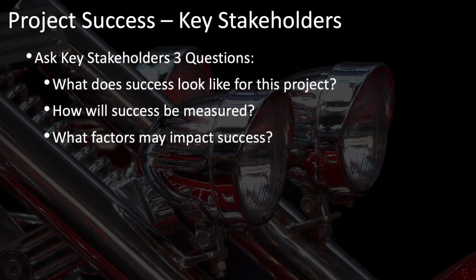Whether the project manager was involved in the project benefits management plan or not, the project manager should still ask the key stakeholders these three key questions surrounding project success. What does success look like for this project? How will success be measured? And what factors may impact success? Asking these questions and exploring the answers with key stakeholders can be critical to project success.